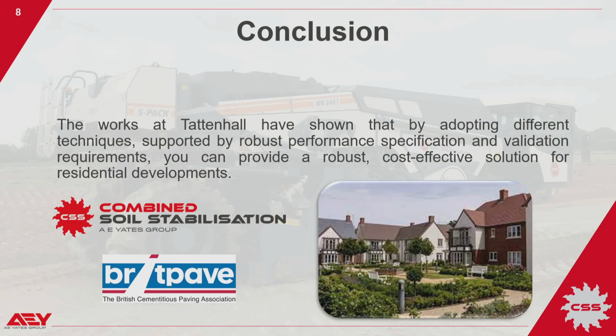The earthworks element was required regardless to achieve the required subgrade levels and provide a platform for a pile foundation solution. However, the stockpiled soils were too wet to be placed as a natural general fill. This effectively left two possible options: remove any oversized hard materials and unsuitable soils, add lime and place as general fill, or incur the cost of disposal of the unsuitable materials off-site and import suitable fill materials prior to piling.